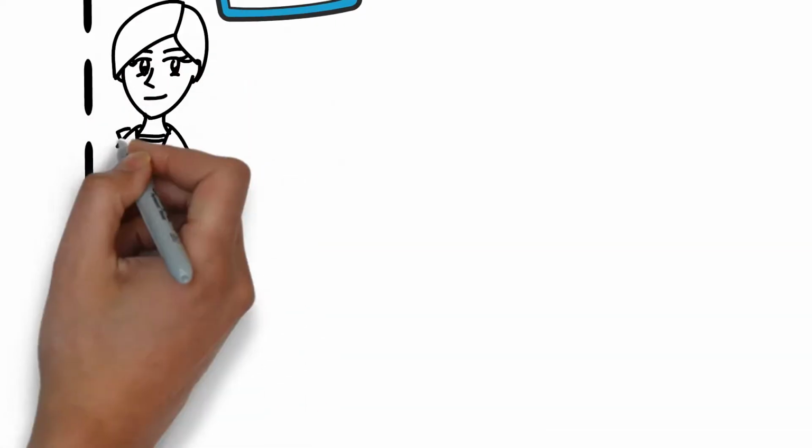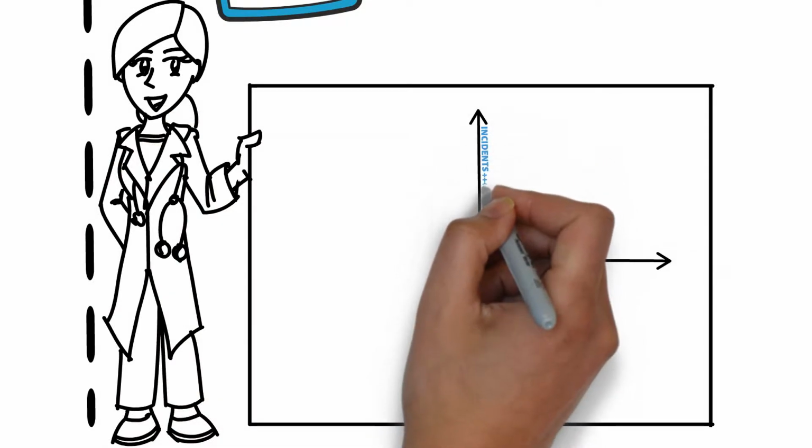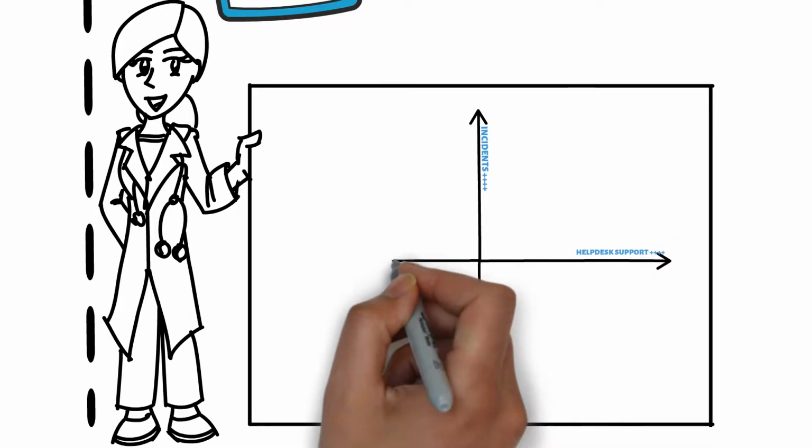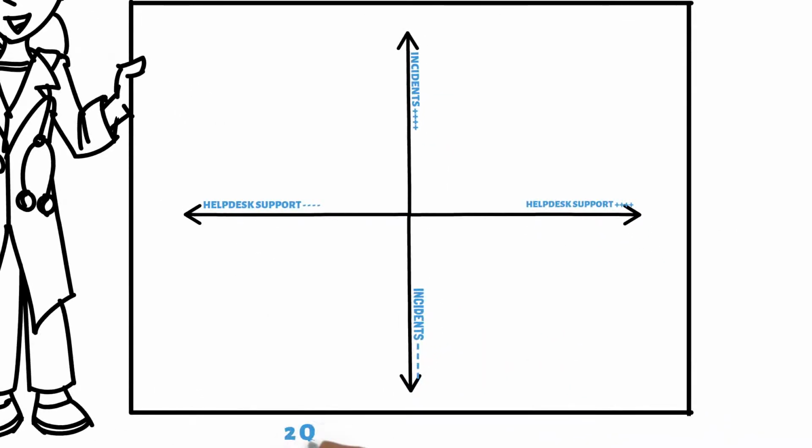Select the top two and on a whiteboard, create a chart with two axes, X and Y. Label the X axis according to the first item on the list and the Y axis being the second item on the list. Now ask the team to split in two, give them two quadrants and ask them the following questions.